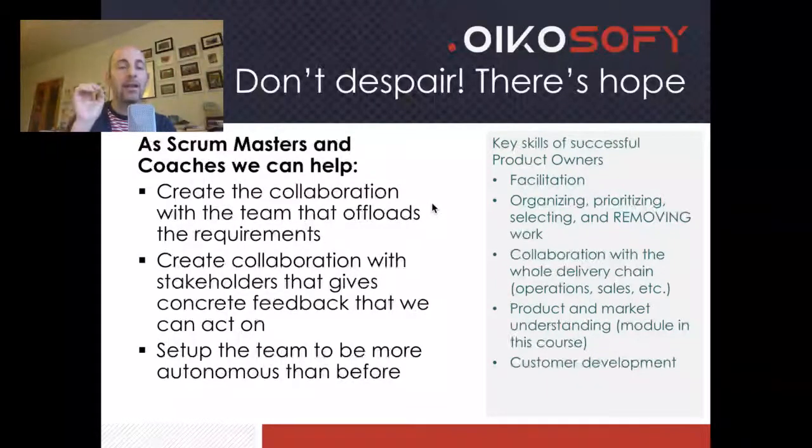Don't forget that as it used to work before, product managers would just add things to the requirements document. And then once that was closed and final and approved and funded, they would come back and they would have change requests. Very familiar process, right? Well, in Agile, we don't have change requests. Everything is change, right? Agile is about welcoming change. So that's what we do. We organize, we prioritize, we select, and we remove work.